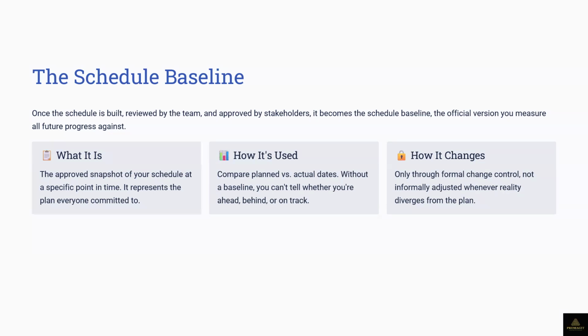So you don't change the baseline once it's agreed, because that's the basis of comparison. You don't shift the goalpost. Basically, that's what we are saying here when it comes to the schedule baseline. It's set, it's cast in stone, you put it there. It's only when something material changes that it has to be changed, and everybody agrees that okay, we're going to be rebasing.